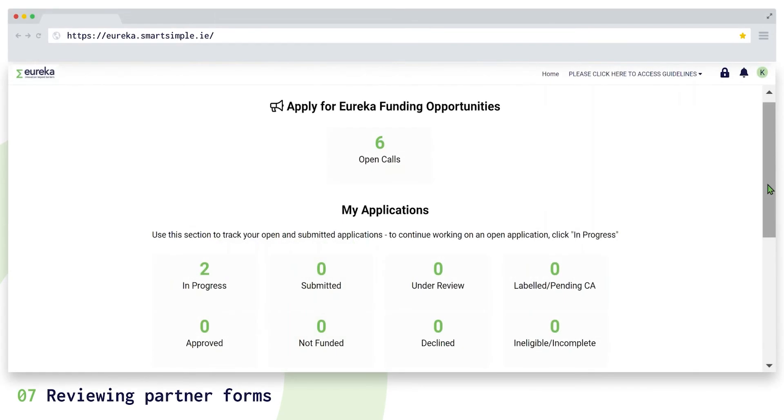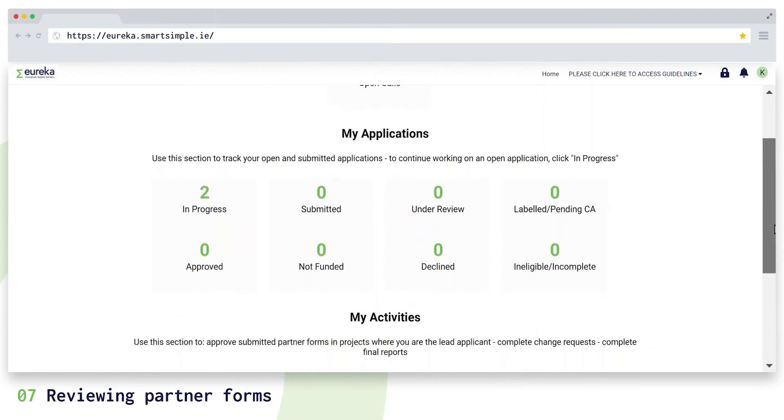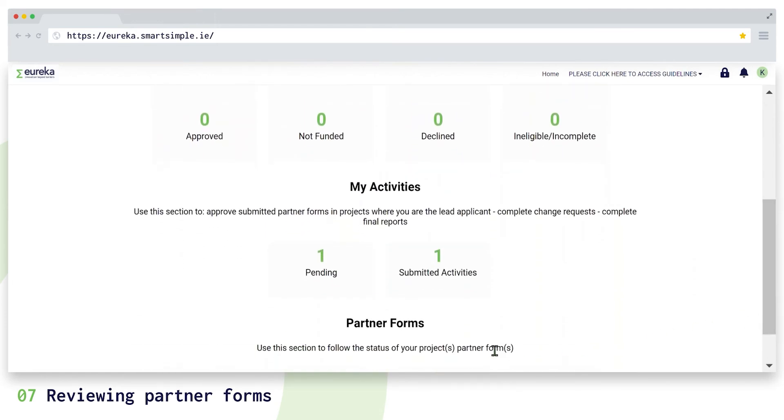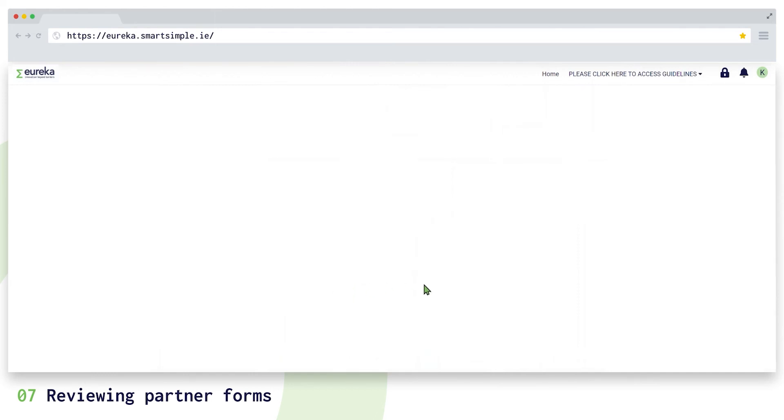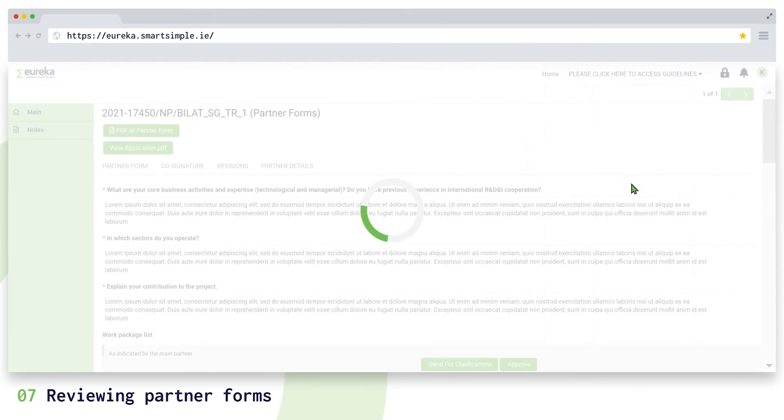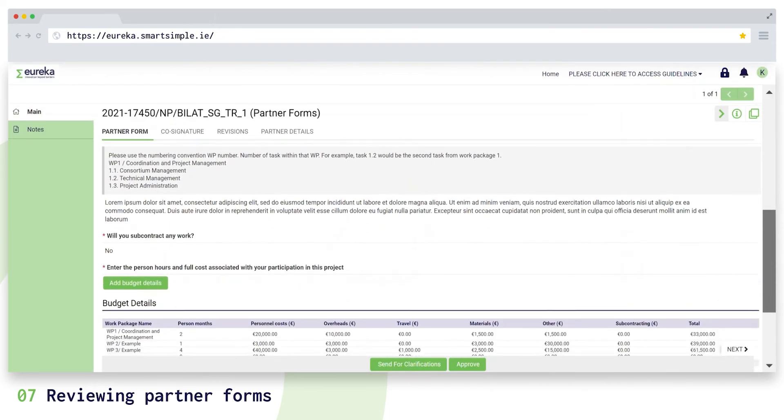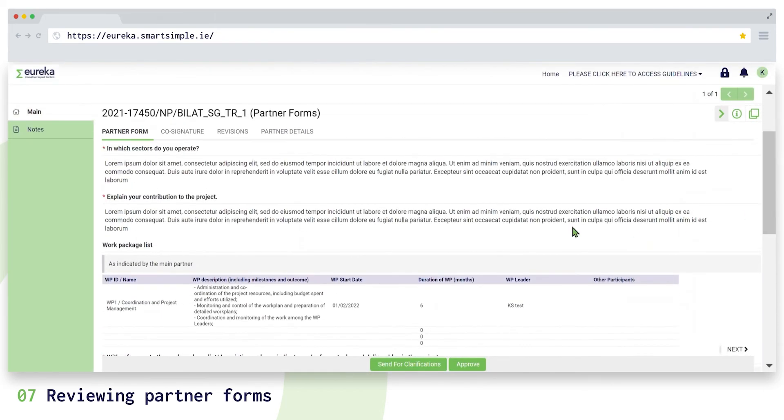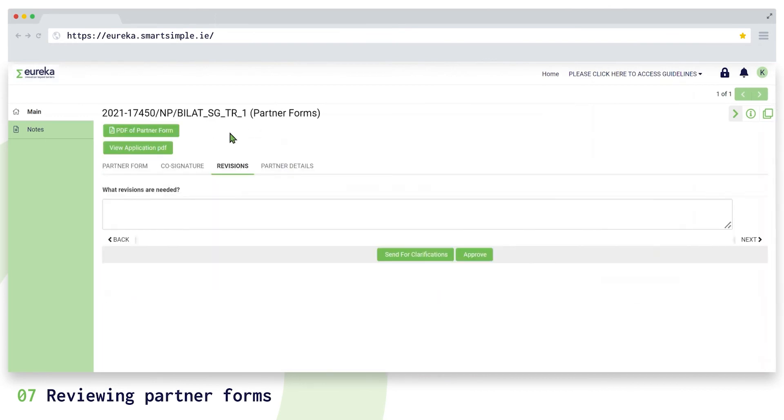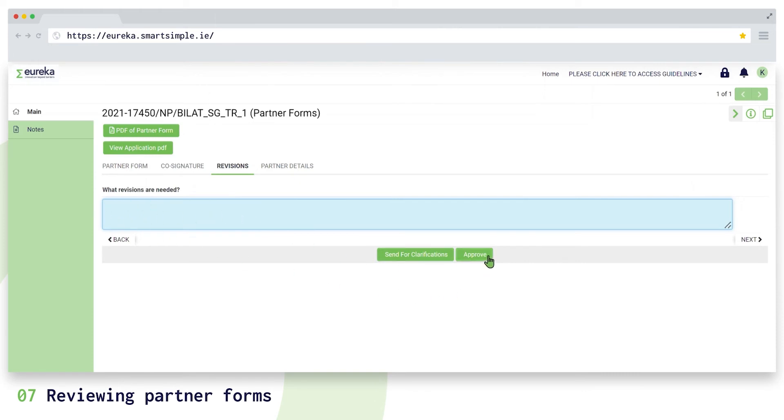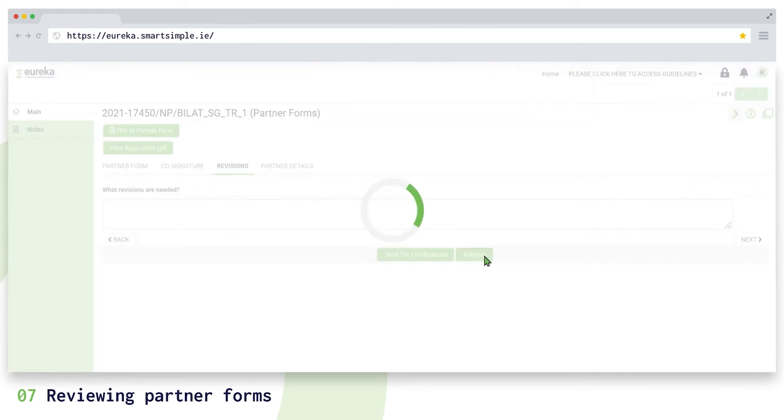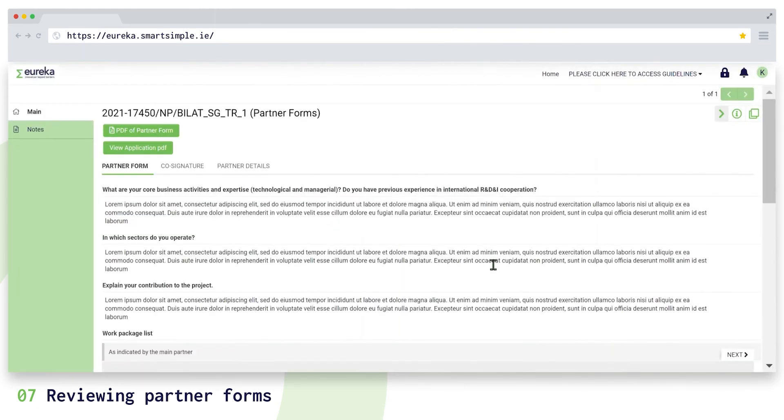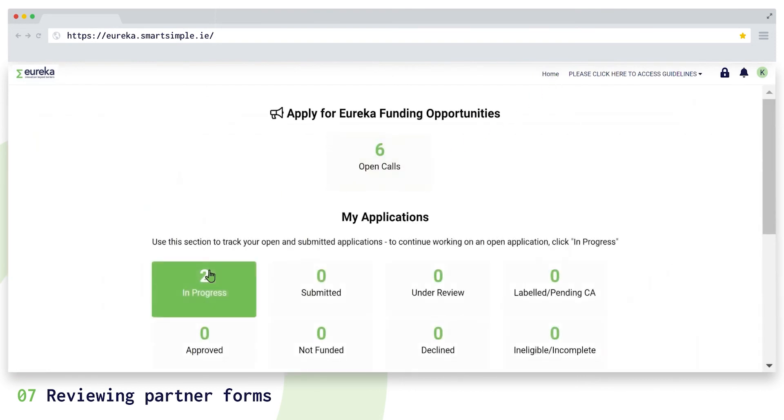The main partner has some more work to do. When a project partner submits their partner form, you, the main partner, will see a new pending item on your dashboard under my activities. You need to open and review the submitted partner and co-signature forms. If you think parts of the form are unclear, visit the revisions tab, specify what your project partner needs to change, and click on send for clarifications. If the form is correct, click on approve. When all partners have submitted their partner forms, this will be listed in the overview of the consortium section of your application form.